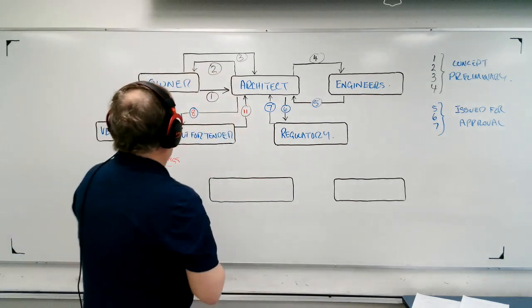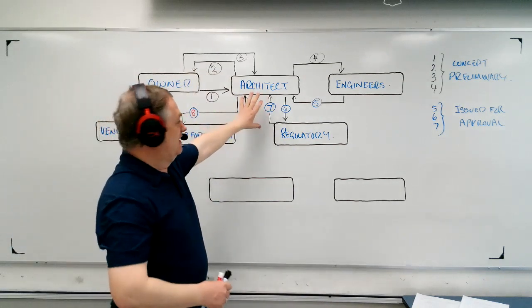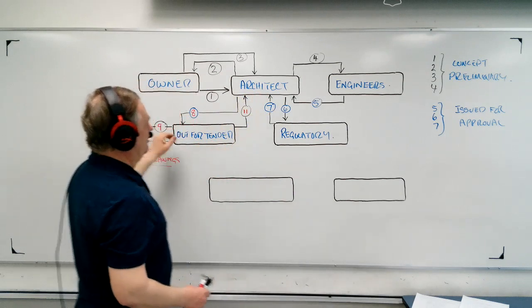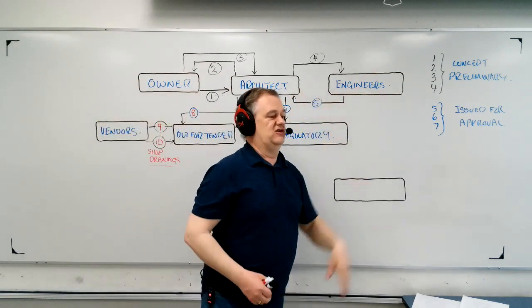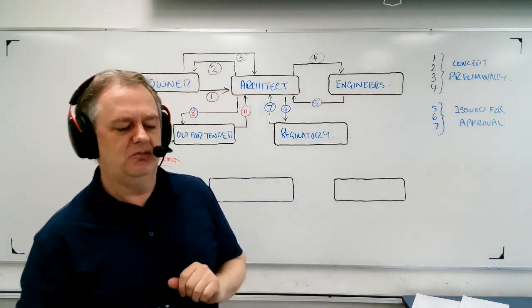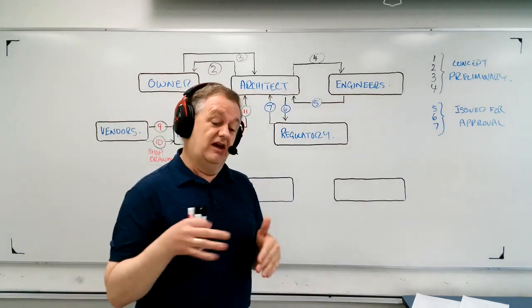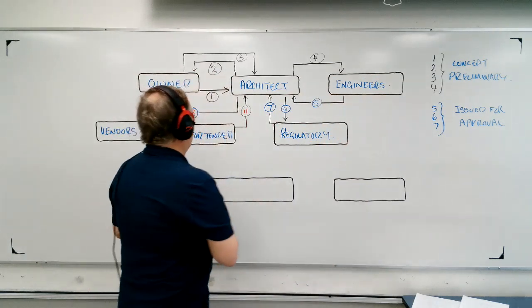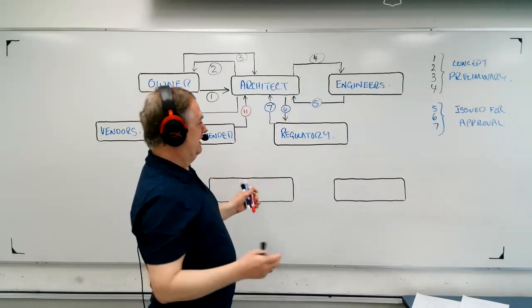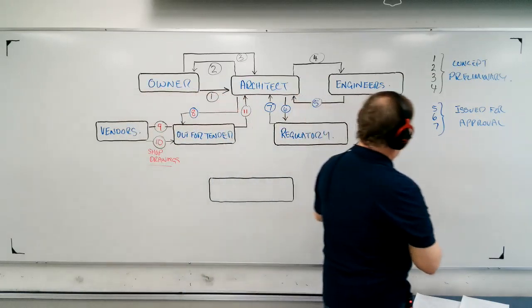And so before they make that decision, usually what happens is these shop drawings that were given for all this equipment are usually forwarded to the engineers, and they look it over and give their approval, and they say, yeah, that does meet our spec. Yep, that's good. And they sign off on it. So then the architect will say, okay, perfect. Everything's in place. Now let's just see where we are at here.